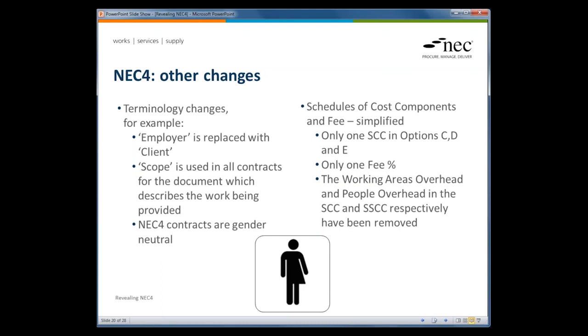We've also changed to single fee rather than having the subcontract fee in the contract as well as a main contract fee. What we've also done, and this is a bit more radical, is to introduce a schedule of cost components into all the contracts. So each contract now has payment based on defined cost plus fee, and defined cost will be assessed in accordance with the schedule of cost components. So that's the same across all of the contracts now. So term service contract, professional services contract, the short form contracts all have a base of defined cost plus fee.